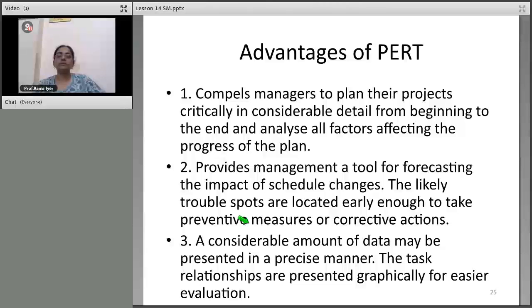So you're saying 1 to 2 takes 14 days, but 2 to 4 takes 10 days. Okay. Are you getting it till here? And then you're saying 2 to 3 will take you 7 days. Alright. And then 4 to 5, which is your costing of the production. Both have to get over, no? For me to do the costing, the production has to get over, no? So, D will happen and then 10 days will happen.